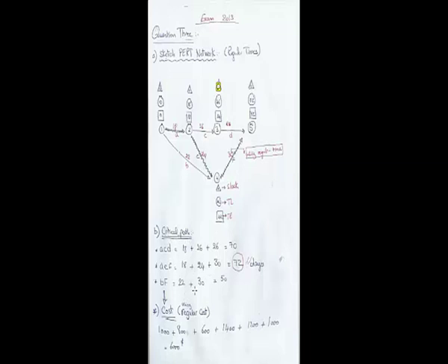And if you have got several paths, you choose the critical path using the path that has the greatest amount of days or the largest amount of days. Okay. Second point, or the last point in the original Pert network, using the regular cost, I mean, is that you calculate the cost for the project using the regular cost given to you. Okay. Then you are suggested that you should crash the project from the regular days to the crashing days.